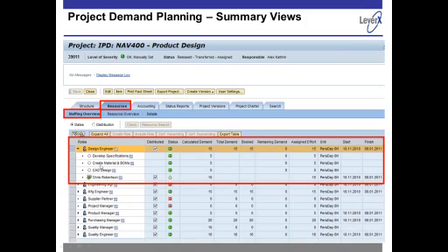So here are the tasks: CAD design, create BOM, create spec, that have been assigned to the design engineer, and a person, Chris, has been assigned to the role of design engineer. You can have as many Chris's as you need on the project. If you need 4 designers, you can have 4 designers here, and then have them assigned to their different tasks. And then the system will say, what is your assigned effort? What is your total demand? The system's managing all of this for you as part of your buildup.